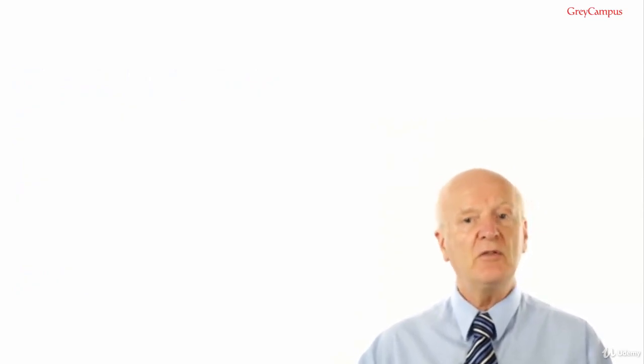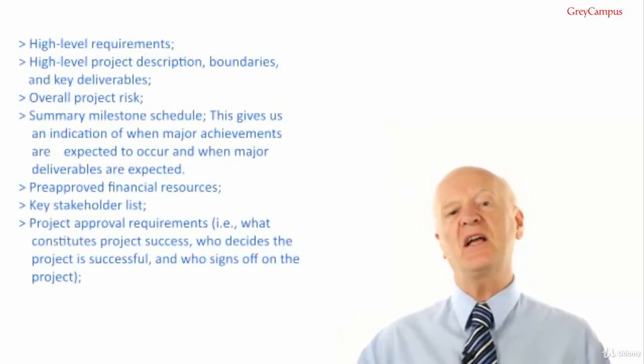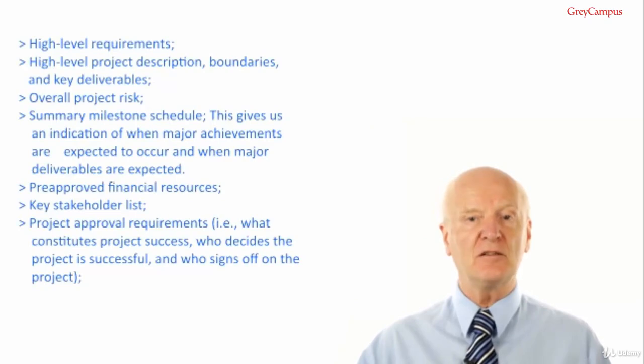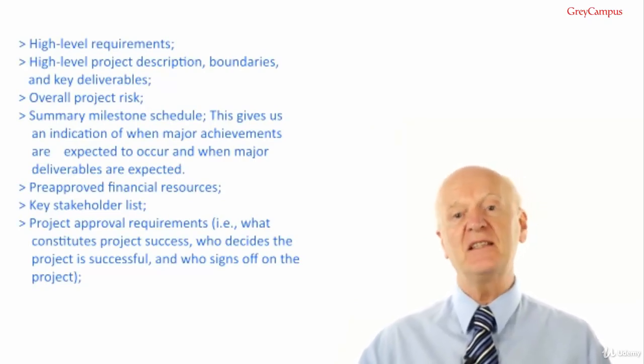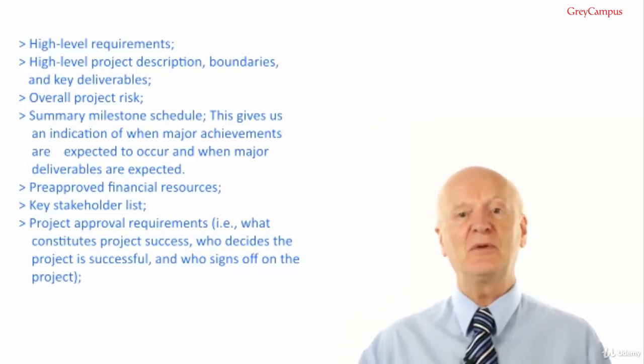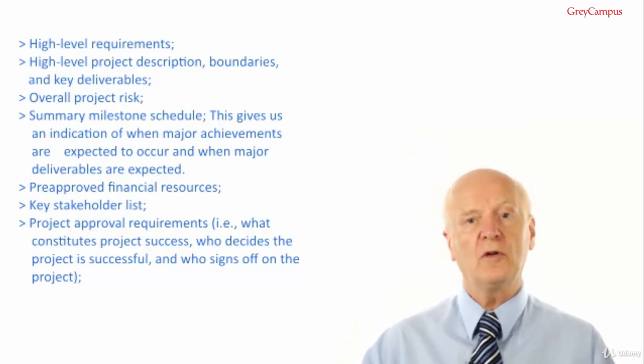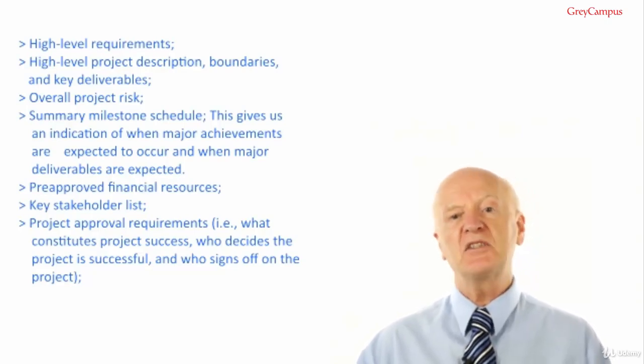Please note that the project objectives must be measurable. To increase sales is not an objective, it's subjective. An objective might be to increase sales by 7%. High-level requirements. Everything in the charter is high level because you haven't done any detailed planning yet. And in fact, you haven't actually done any high-level planning yet either, because this project doesn't exist until the project charter has been signed. High-level project descriptions, boundaries and key deliverables, overall project risk, summary milestone schedule.